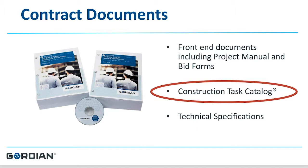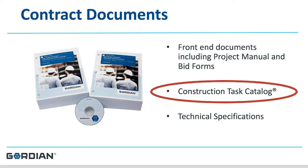Another contract document is the construction task catalog — a customized price book that Gordian puts together on behalf of their clients, with pricing customized to reflect the local economy. The third contract document is the technical specifications, which tell the contractor the quality level of every item in the construction task catalog, and can also include warranty information and care and use instructions. The technical specifications are critical and must be tied to every item in the CTC.